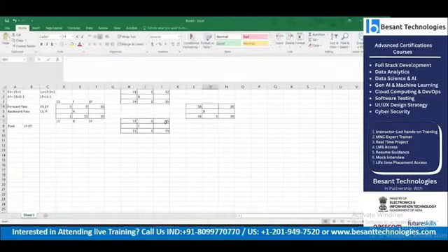For D, it is 0. I initially said that an activity with zero or negative float is considered a critical activity. So from this calculation, can you say which activities are critical?